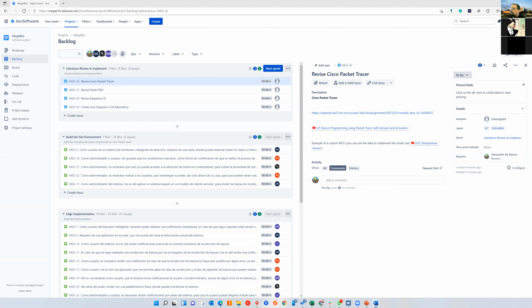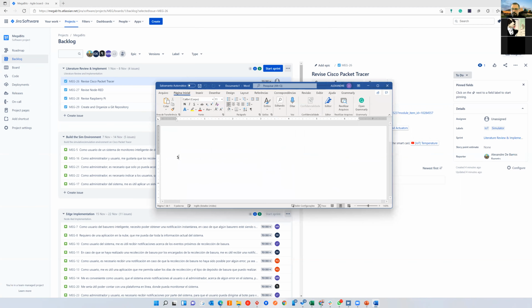Maybe like 4 hours. 4 hours? Okay. I believe 4 hours is enough. It means that one day you have 4 hours and 2 story points. And a week, you have 5 days and 10 story points. Do you agree? Yes, sure.